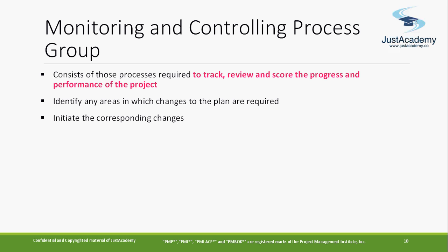Any changes need to go to the change control board. There is one process in integration management called perform integrated change control, where any change asked for in the project, like a new requirement, has to go through the change board. There should be some meeting, some discussion, right? A developer can't just accept it and start doing it. That is the standard process, but normally in small projects, when new changes are asked for, they will just say, yeah, we'll do it, we'll complete it.